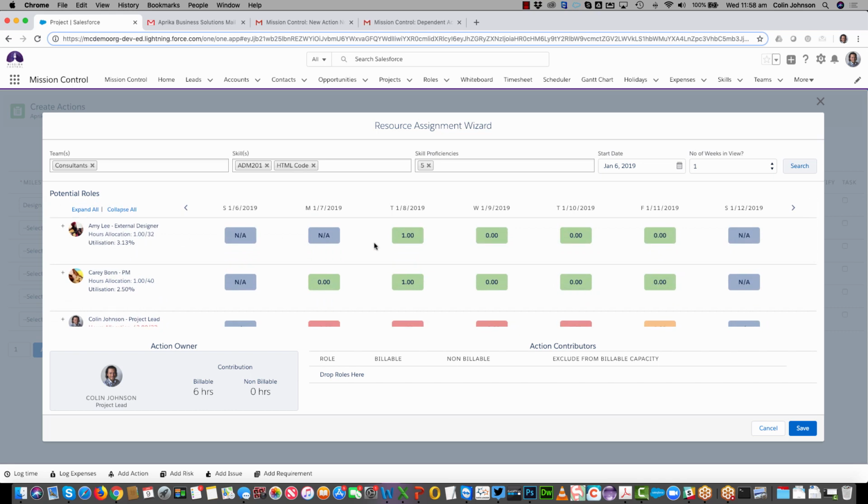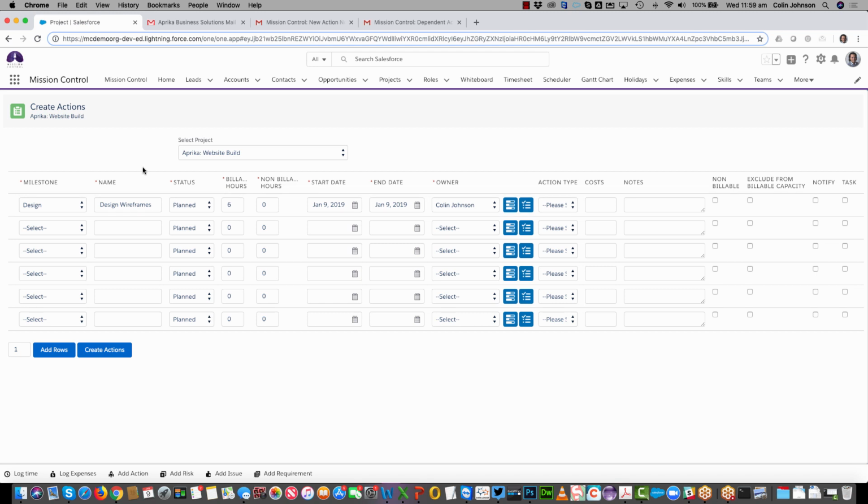So if I scroll up, I can see Amy's got plenty of time. So what I'm going to do is pull Amy down here as a contributor, and of my 6 hours, I'm going to get Amy to do 2 of them. I'll also pull Carey down, and basically between the 3 of us, we'll be doing 2 hours of work each. Now, that's my action built out.